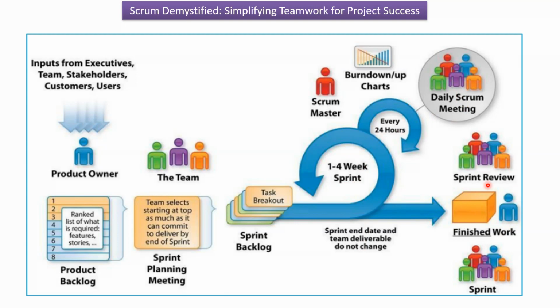At the end of the sprint, a sprint review meeting and a sprint retrospective meeting will be conducted by the team. In the sprint review meeting, the team demonstrates the completed work to the stakeholders to get their feedback. In a sprint retrospective meeting, each member in the team will share what went well, what did not go well, and how they can improve in future sprints.